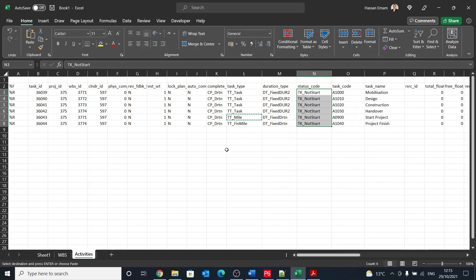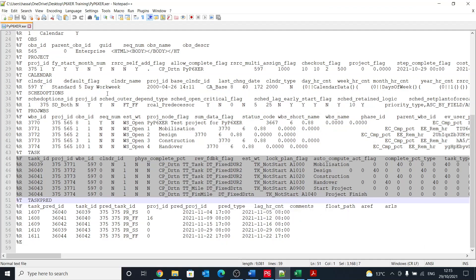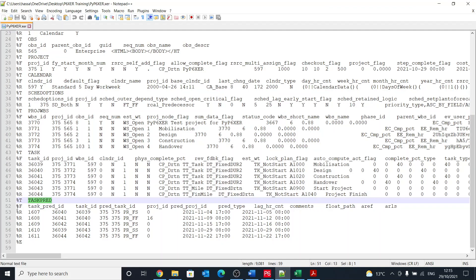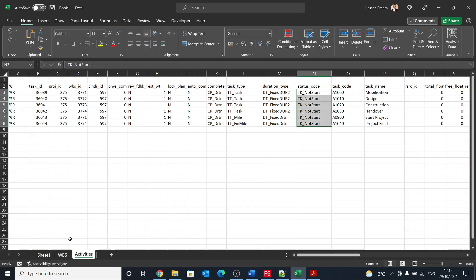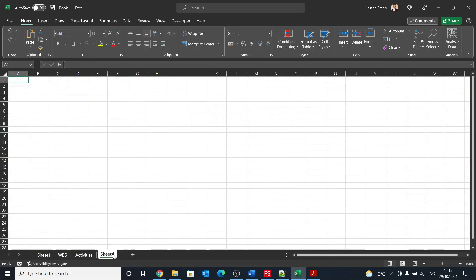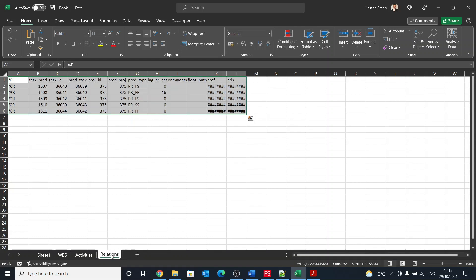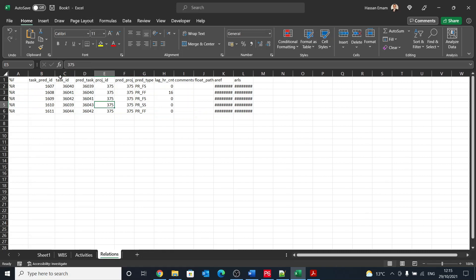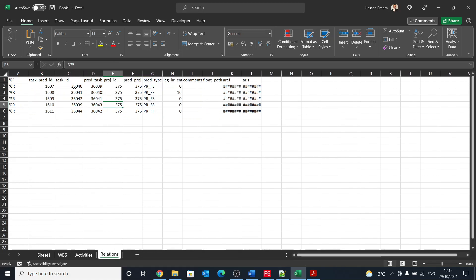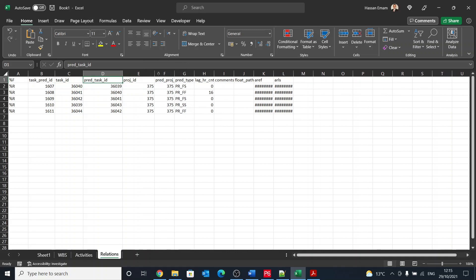Then the last one in the current file that we've created is task pred, and task pred is an abbreviation for task predecessors. So I will call this relations, and let's paste it in here. And here what we have is basically a reference task ID and then preceding task ID, which is pred task ID, and then the project ID.